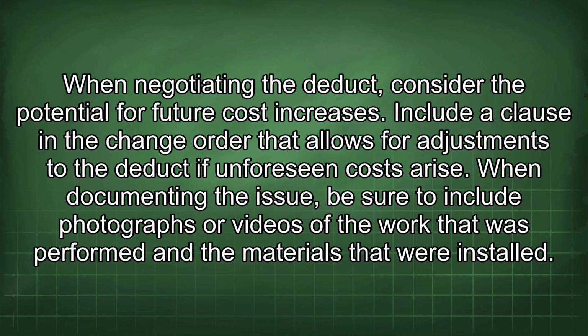When negotiating the deduct, consider the potential for future cost increases. Include a clause in the change order that allows for adjustments to the deduct if unforeseen costs arise. When documenting the issue, be sure to include photographs or videos of the work that was performed and the materials that were installed.